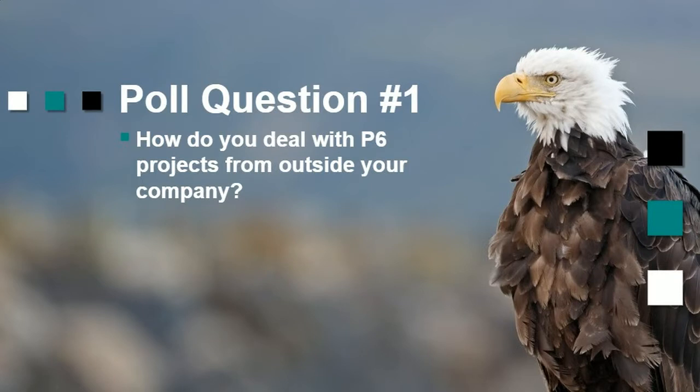Now, that's dangerous. We've seen people modify XERs and actually corrupt the import and bring it in, and it messes up the database. So we had one client that screwed up their whole database, and we were lucky we were able to help them recover. But that violates some of your license agreement with Oracle, so it's dangerous. But people do it, as you're going to see, I'm going to share. People do it. Okay, and then import them right into their production and clean it up. Again, these are what we've seen as the most common.